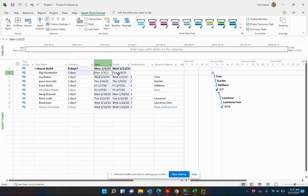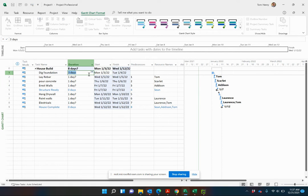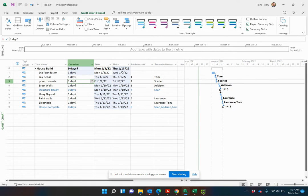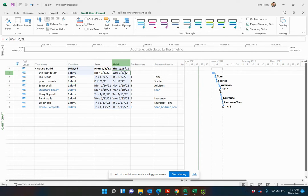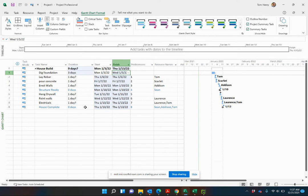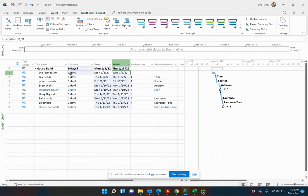It starts on Monday, finishes on Tuesday, so two days. I make it three days, you see that goes to Wednesday and everything else is trickling on from that. The duration column is always there and typically the best way to estimate the duration of your tasks is to come in here and add some duration.